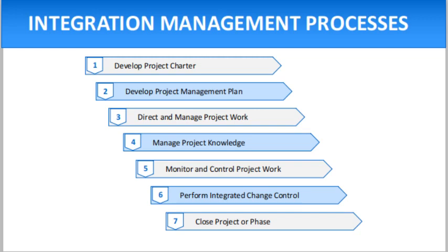Basically, friend, projects typically start out with the creation of a project charter, a short document that provides an overview of the project and identifies the project manager and key stakeholders. A project charter includes the scope, objectives, team members, risk, benefits, budget, and business case. A project charter essentially acts as a foundation on which you can further plan your project. It also helps you gain buy-in from stakeholders, which enables you to move forward quickly and autonomously within the project scope.